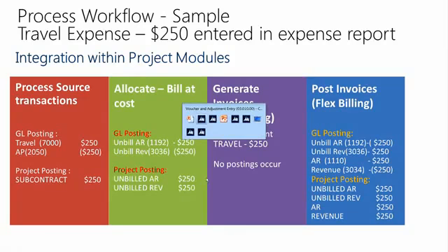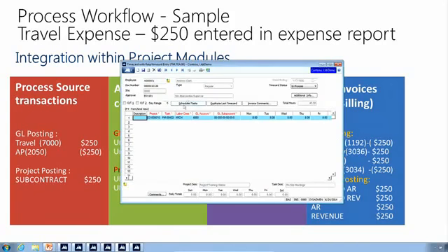However, we also want to look at where your labor would be coming from. So the labor would come from a time card. So this is my time card. Again, I'm putting it to my project. My account is identified as 4050, and when we cover the project time and expense module, we'll cover how those cost accounts are determined. Then we'll see that there's 40 hours on this time card, at 8 hours per day.